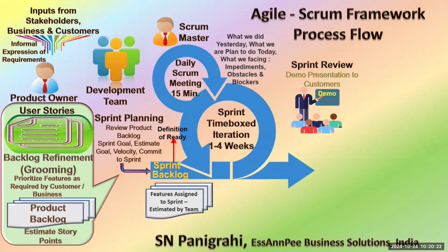When we call the customer, definitely the product owner must be there. So in the sprint review meeting, the development team, the product owner and the customer will be there. These are the mandatory requirements. The Scrum Master, being a facilitator, can facilitate the meetings. All the meetings are facilitated by the Scrum Master, but she need not always participate. Okay, but these are voluntary. If she has spare time, sometimes she can participate. Otherwise, it is not mandatory. But in the sprint review, the development team must be there because they are the performers.